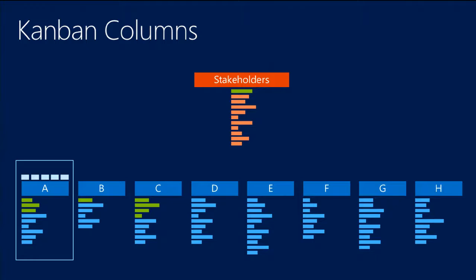But what you also want to do is have the ability to set up the columns that make sense for your organization. And we added support in Cumulative Update 2 earlier this year so that every team, and even our stakeholders now with their portfolio backlogs, can go in and create their own set of columns and take all their work through that set of columns that make sense for them. Now, each of those columns maps to a work item state. So there's a great story here because you can roll it all up still into these coarser-grained items that make sense, but you can still give teams the ability, if they need a couple of extra columns to break down the work or manage the work in a certain way, to do that. So that's one of the ways that we're giving teams autonomy.